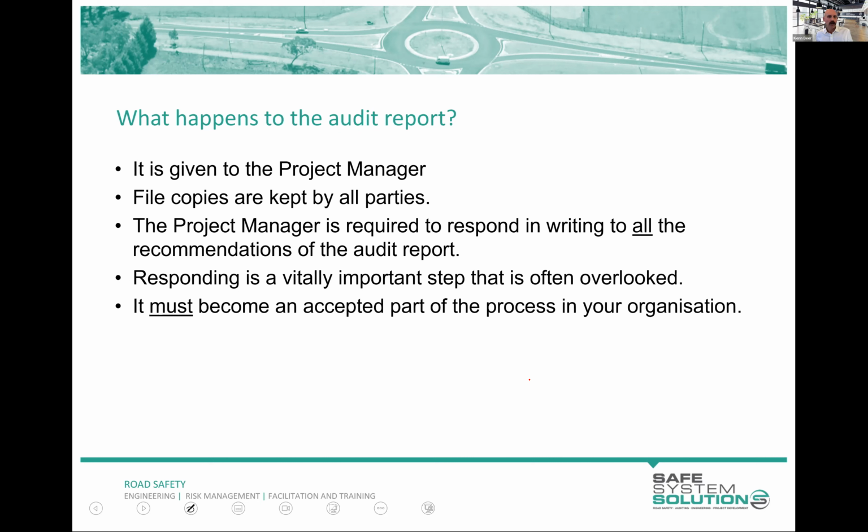Your project manager needs to respond in writing to all the recommendations, and that really has to be part of this process. Technically, you don't need to send it back to the auditor, or the audit team, in terms of what you finally decided to do. But in the collaborative process, it should all play out that way, and everybody should get a copy. But technically, if you wanted to say thank you for your report, your job is done, and take me off your contact list and never talk to them again, that is acceptable.